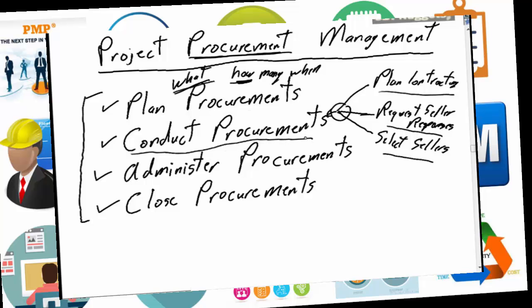And conducting the procurements is, as per the previous release, associated with finding out how we're going to purchase it, talking to our potential vendors and making sure they understand what our requirements are and how the project is going to interact with them, and then finally selecting the successful vendors and ensuring that they understand the terms and conditions that the project will expect of them, which leads into the next piece, which is administering the